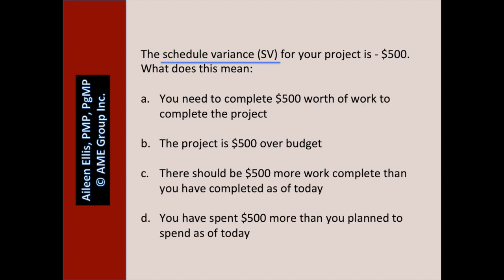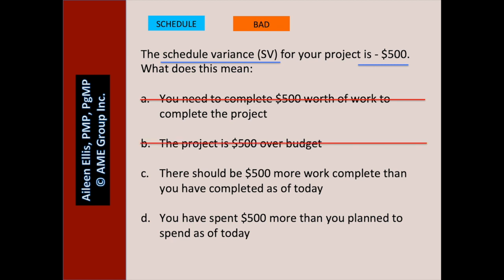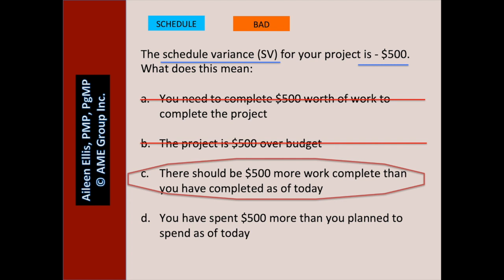The schedule variance for your project is negative $500. What does this mean? Pause the video and answer the question. Is this about schedule or cost? Schedule. Negative $500 — is that good or bad? That's bad. A: you need to complete $500 worth of work to complete the project — we have no idea; that's not what schedule variance tells us. B: the project is $500 over budget — we have no idea because we don't know the cost variance. C: there should be $500 more work complete than you have completed as of today — does that relate to schedule? Yes. And is it a bad thing? Yes. D: you have spent $500 more than you planned to spend as of today — D is about cost. So C is the best answer.